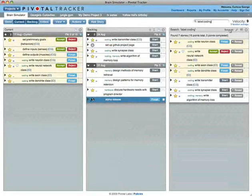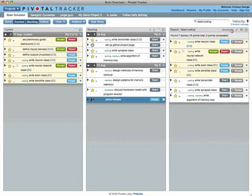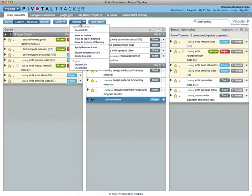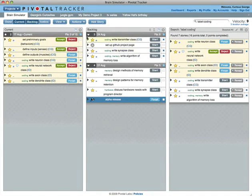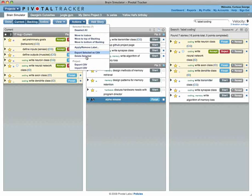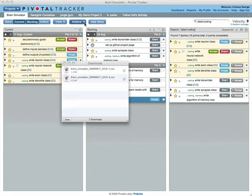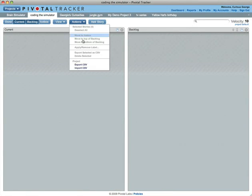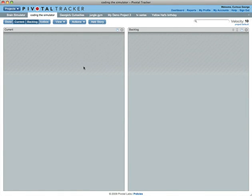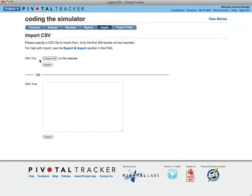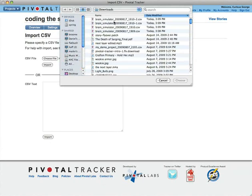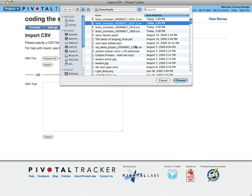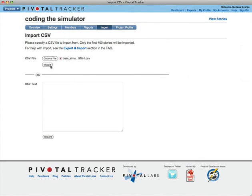You can export stories to a CSV file, in a group or all at once. This is how you move stories from one project to another. Import can handle a CSV or a plain text file with a story title on each line. CSV files are compatible with a huge range of systems, including any spreadsheet application.